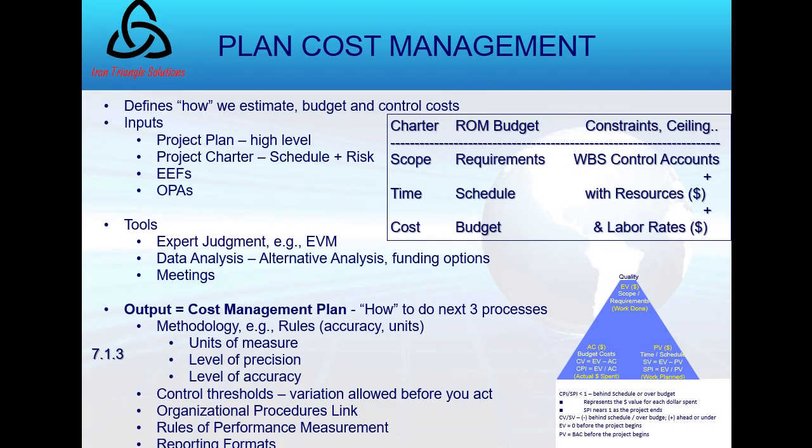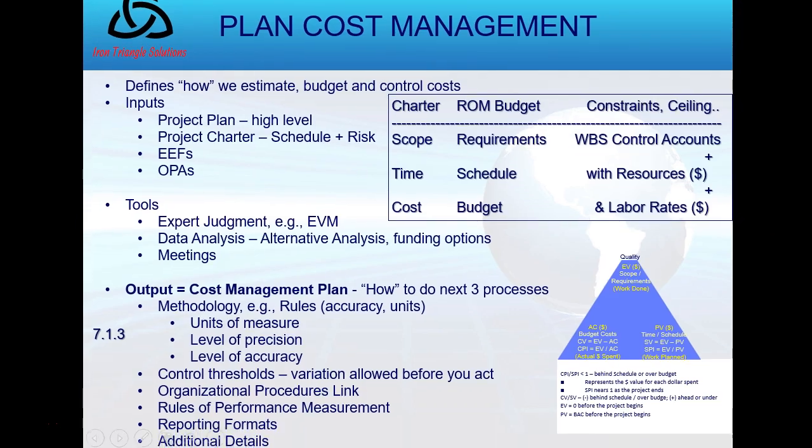What are my reporting formats? So in reporting formats, well, if it's a global project, do I want to report in dollars or in euros by some day of the week? What is the currency transition rate? Things like that. You will address that in the cost management plan.